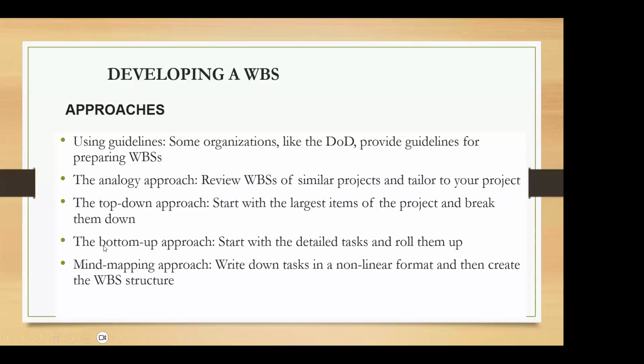Then you have the bottom-up approach, right? You start with detailed tasks, then you roll them up. You start at the very bottom, you identify the detailed tasks that you have to do in order to complete the project, and then you can group them into different, broader areas.